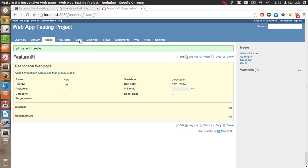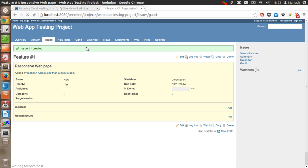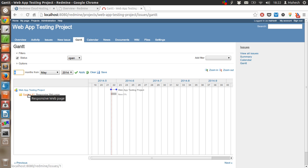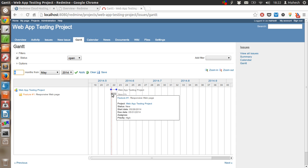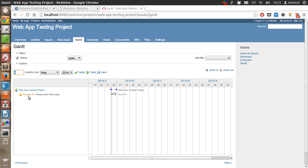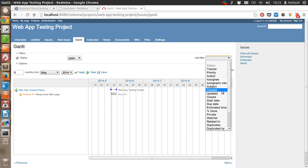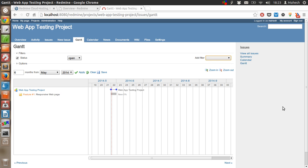Let's come back to the Gantt chart and see if it has any change. Our issue is added here, which is a feature request, and that is in this Gantt chart. Whenever we add a feature, bug, or support request, the Gantt chart will reflect here in timeline mode. You can also filter based on status, tracker, priority, author, assignee, subject, created, and other things.